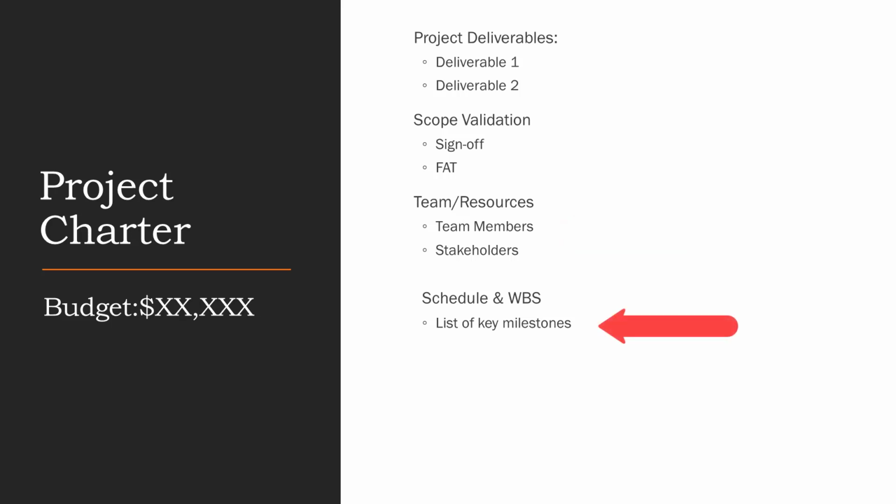Schedule should be ideally prepared in a scheduling software such as Microsoft Project, and a charter only indicates milestones like start, finish, phase 1, deliver dates, end of the project. Charter also needs to include budget. For example, you can provide the information such as sold at, margin, and the project budget.